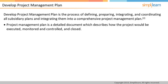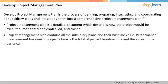Many people think that the project schedule developed using Microsoft Project is the project management plan. However, that is not true. Project management plan contains all the subsidiary plans and their baseline value. It also contains the allowed variance in the baseline value.